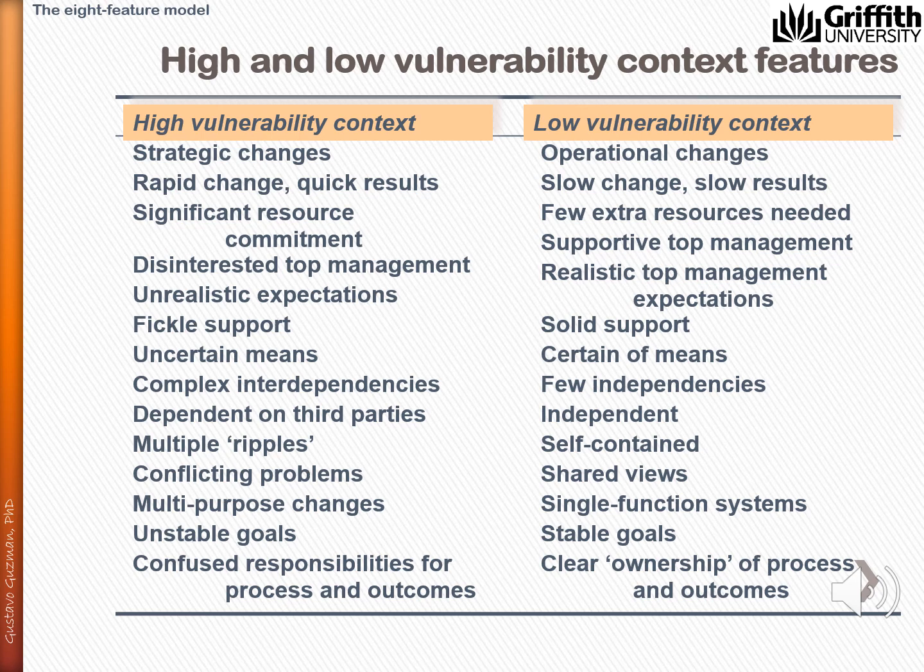The key point here that I want to make is that there is a close relationship between the type of project and the context. This means that context shapes your project. For example, a simple conventional project using a very well-known technology may turn into a nightmare in a high vulnerability context.